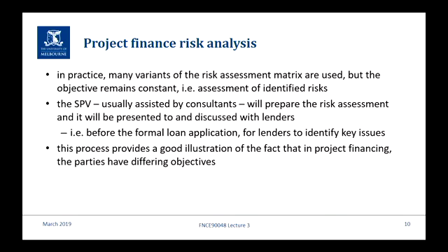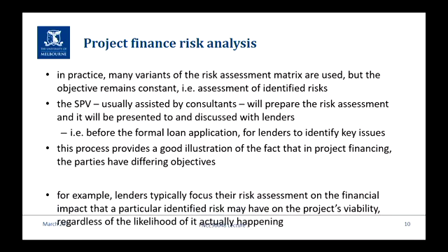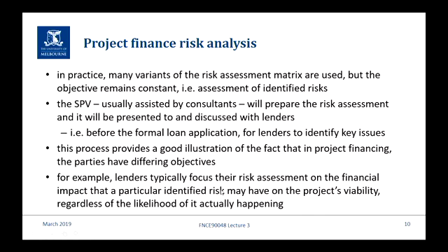And the other thing that you find is that in project finance, like in lots of transactions, the parties to contracts have very different objectives and they focus on different things in negotiating. So for example here, the lenders don't really look at the likelihood so much as the potential outcome. Because remember, I'm a lender, from my viewpoint, what I want to ensure is that I get all my money back. So the risks that bother me are the ones that could stop me from getting all my money back. So the ones that are the really big loss items are the ones that we're concerned about. So they don't really focus on the likelihood, rather just the economic impact.